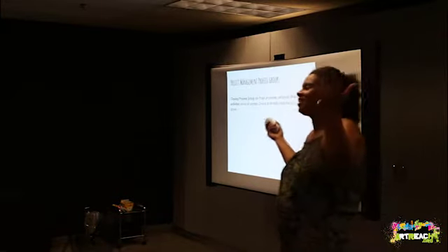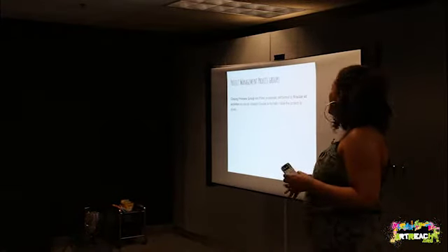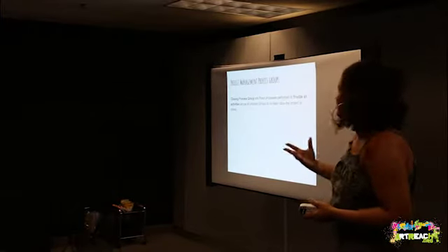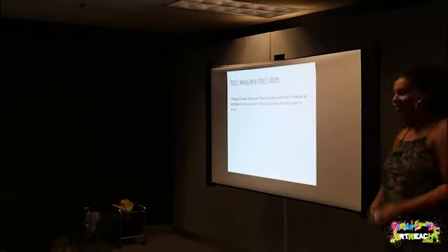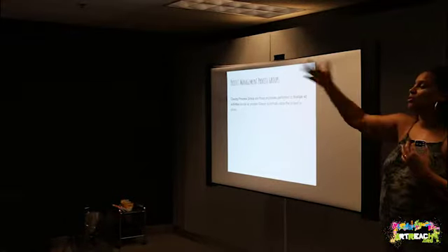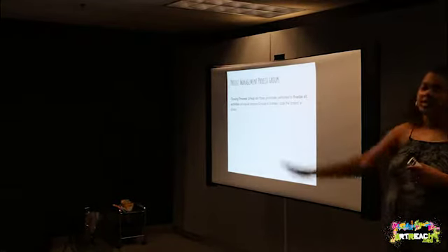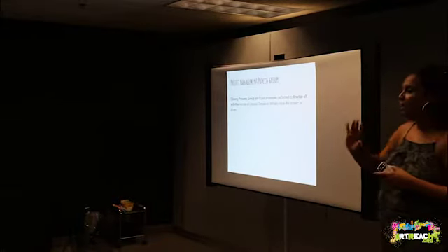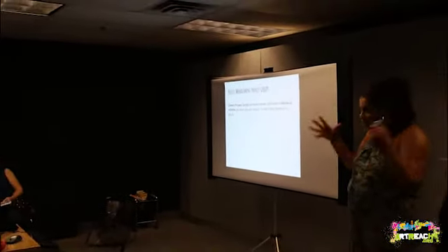All right, and then you're closing, yay, the end of your project. These are all of the processes performed to finalize your activities across all process groups to formally close a project or phase. What that means is that when you're closing your project, you're not just saying, last workshop, do your evaluation, pizza party for all, yay. It actually means you have to close anything that was outstanding from the last four process groups. So if there was anything in the initiating phase, or the monitoring and controlling phase, or the execution, or the planning process, make sure all of those aspects are closed before you close the entire project.